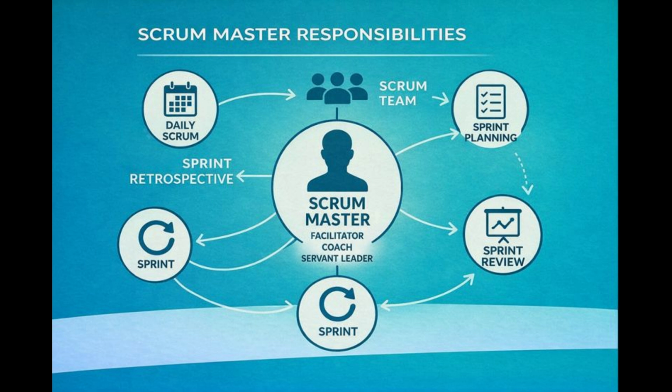They guide conversations, facilitate Scrum events, and support the product owner in keeping the backlog ready and prioritized. Importantly, Scrum Masters do not decide what is built or how technical work is done. Their authority applies to the process, not people. They help teams reflect when commitments aren't met and encourage improvement without assigning blame.